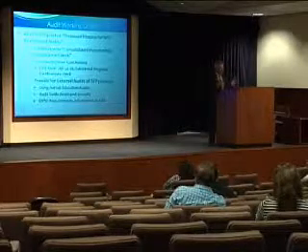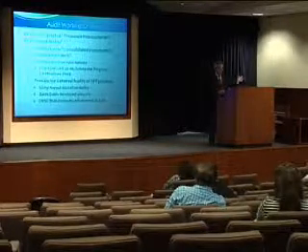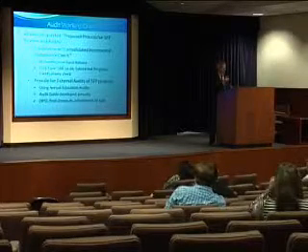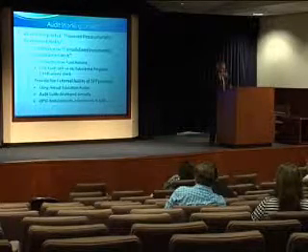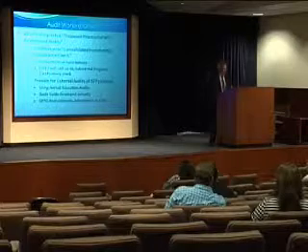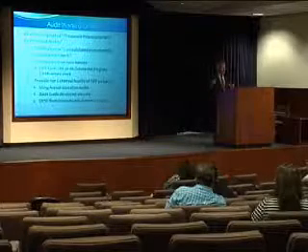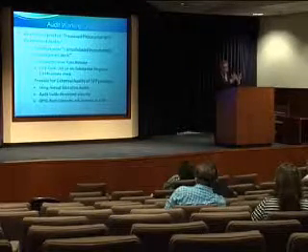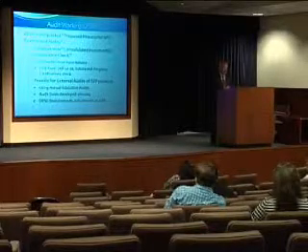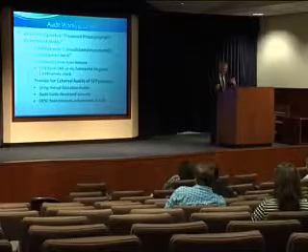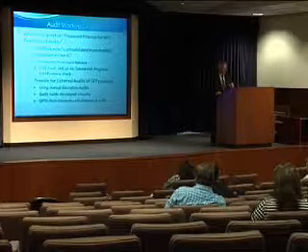Right now, and you all know this more than I do, you submit your expenditure report, your 5006 at 12 months, you submit your substantial progress certification at 18 months, and you have certifications that are often checked on the back end of the project in audit or final review. And the board was concerned that as much as possible, certification review would happen at the front end of the project, and that all of the reviews would be consolidated and streamlined to make it easier both for OPSC and for the stakeholders.